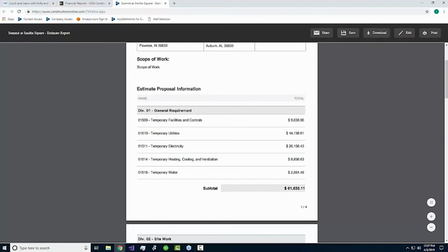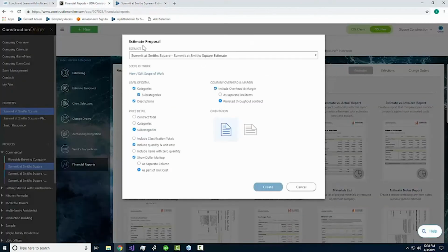Yeah, exactly. So, common questions that people will ask me, especially about generating proposals, is, first of all, we want it to look nice so that we can present that to the client. But in most cases, we also have a few questions or concerns. You'll have different types of contracts, of course, with your clients, and that will really determine how transparent we want to be. So when we're creating that proposal, if we go back to the wizard that Jordan was looking at here, in some types of contracts, you do want to be transparent and really show those markups and connect those dots from a base cost, and show the markup and show every price for every line.